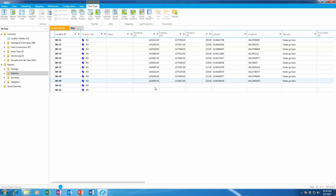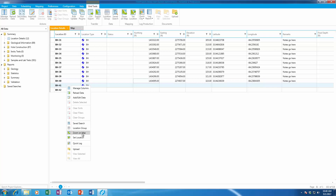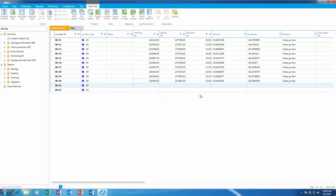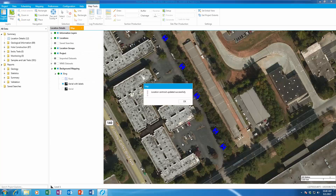Today we're going to be looking at how you can use HoleBase's Site Investigation planning capabilities combined with sending that planning details to your field users using P-Log tablet. I have an existing project where I have a bunch of boreholes already. I am going to add these two new boreholes — you'll notice these don't have coordinates at this point. We're going to indicate where we want these boreholes to be drilled so our field personnel know where it is.